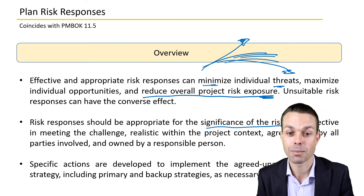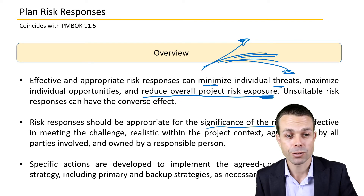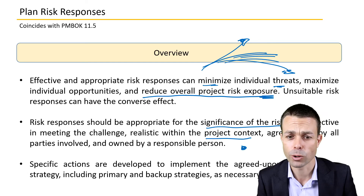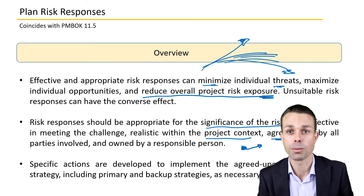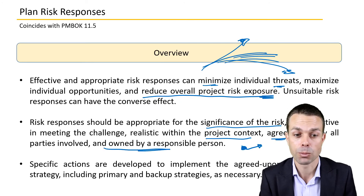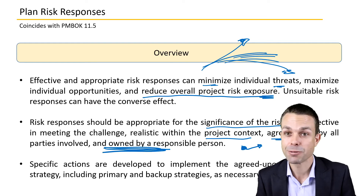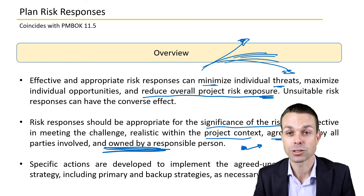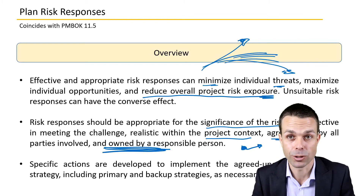Risk responses should be appropriate for the significance of the risk. If it has high probability and impact, we may need a serious risk response. They should also be cost effective and realistic within the project context. They need to be agreed upon by all parties and owned by someone — usually from the affected area. Specific actions are developed to implement the agreed-upon strategy, including primary and backup strategies.